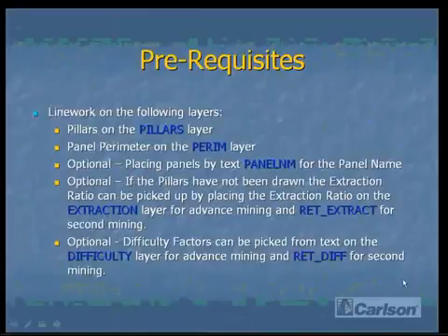If you are going to place your panels by text, using the auto place panel by text method, then in addition to the line work, we can input some of our planning assumptions by just simply placing the text inside the panels on special reserved layers. Then when we use auto place panel by text, the data will automatically be tagged to the panels.